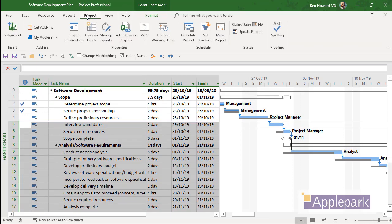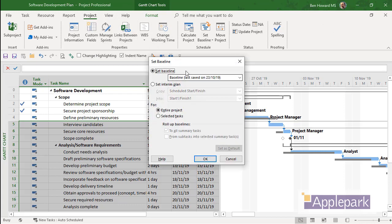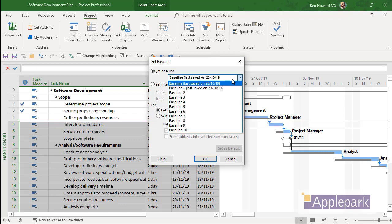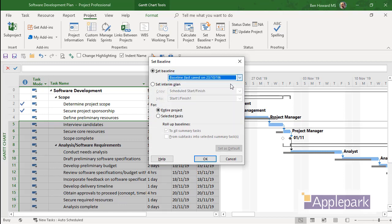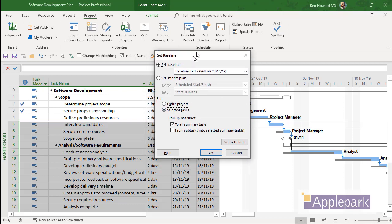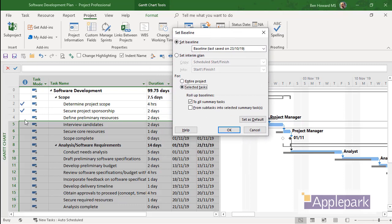We'll just click on the Project tab, select Set Baseline, Set Baseline, and I'm going to update this first baseline, baseline zero, but I'm going to do it for selected tasks, i.e. the tasks that I've highlighted in the table here. We can click OK.